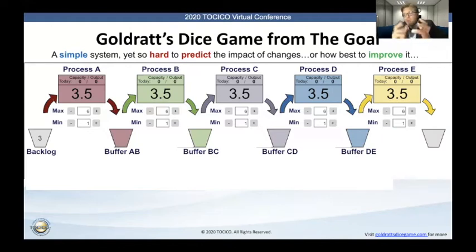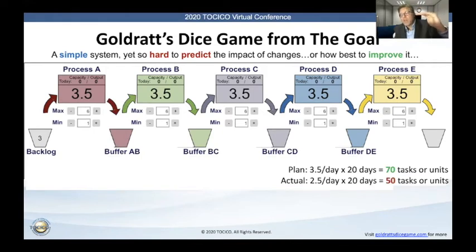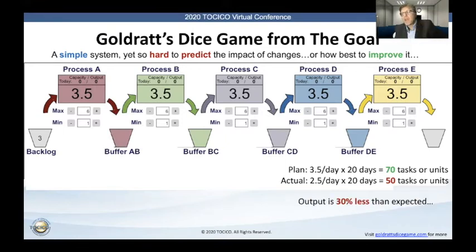That definitely helps, and you can play the simulation game — we've got a Goldilocks Dice Game version that's a free app you can download and play around with. What you'll see is if you get the buffers right, you made a commitment of 70, and you can substantially improve performance by just adding buffers to decouple the system. You've moved from a chaotic system with interactive constraints to a complex system with multiple but non-interactive constraints. You can typically increase output from about 30 or 35 all the way up to about 50 tasks per month — a substantial improvement. But there's still a problem: you are still 30% less than what you expected to produce, so you are not meeting commitments to both your customers and shareholders.